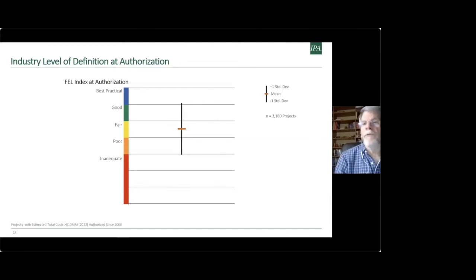Now, in my sample of almost 3,200 capital projects, this is showing where the average FEL index fell for these projects at their authorization. And they fell within the kind of the fair category, in the middle of the fair category, with a standard deviation. Some projects were better defined at authorization. And unfortunately, a fair number of projects don't complete nearly enough of that work that they should complete based on our research prior to authorization. So given this information about what do we know about the level of development of the front end loading? And earlier, I had shown you how we know the safety performance of projects after the project was completed.